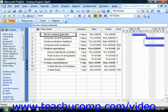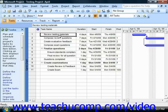Note that you are not required to assign resources to tasks. There are some tasks whose duration cannot be reduced by assigning additional resources. However, for most tasks, effort-driven scheduling allows you to know when a work resource is supposed to be working and on what tasks they should be working. It can also prevent over-scheduling of the resources that are available. For example, using effort-driven scheduling can prevent assigning too many tasks to a single work resource. It also allows you to track the costs associated with the resource as it completes the task in the project.